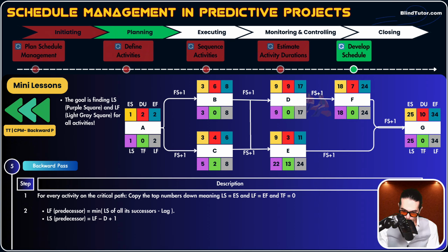Guys, normally, if resources are on time, if materials, everything is on time, the earliest time you could start working on activity E is day 9. But since activity E has 13 days of float, it means you can postpone working on activity E up until day 22, for example, April 22nd of 2027.